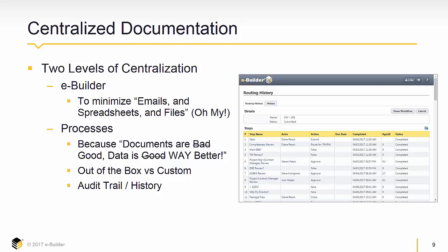And underlying all of this discussion about processes, of course, especially with respect to the focus of today's talk, is the fact that processes maintain a history of every action and every data change that's been made to an instance, even including when comments are made or when files are attached. That gave us a great audit trail that we could use to show that we're following our procedures and everything is above board, so we don't end up being that guy behind the curtain.